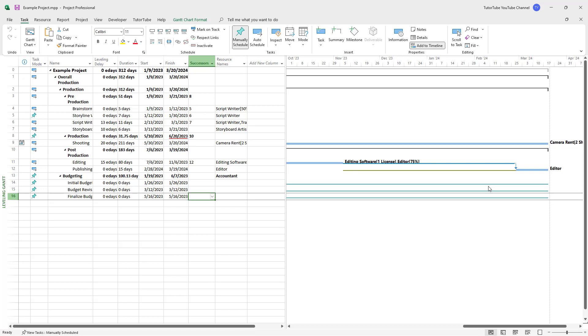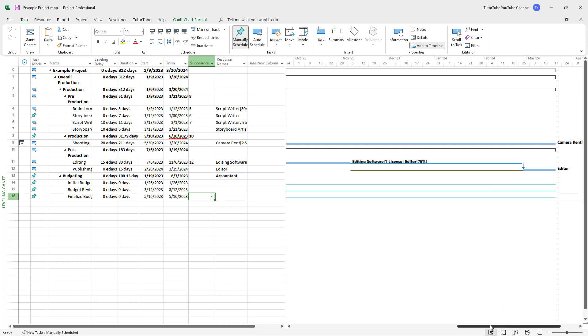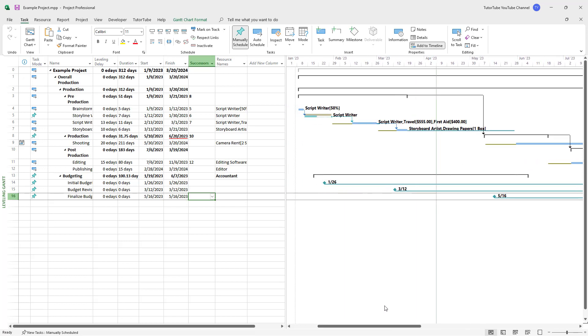If you want more flexibility for how much time it takes to complete the project, or if the project delays and you want to leave extra room for delays, you can utilize leveling delays in Microsoft Project.